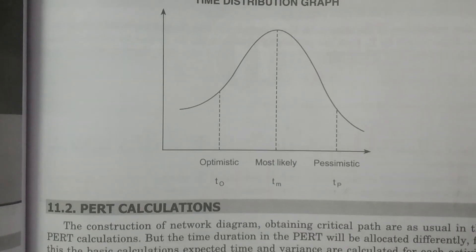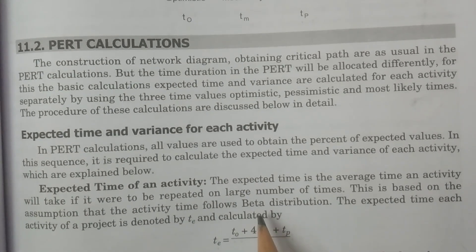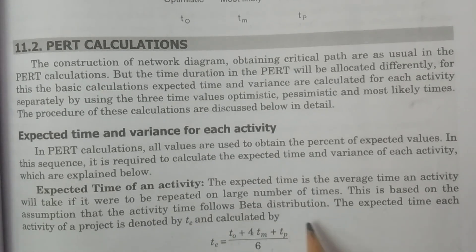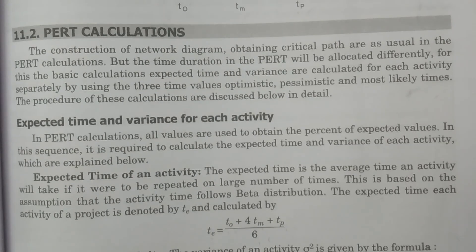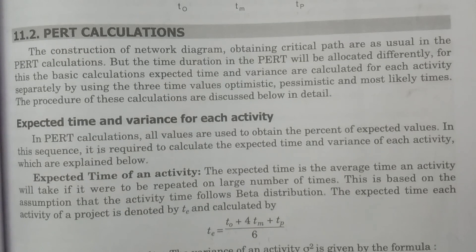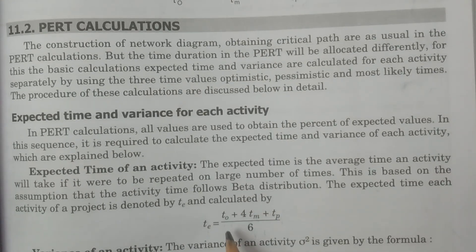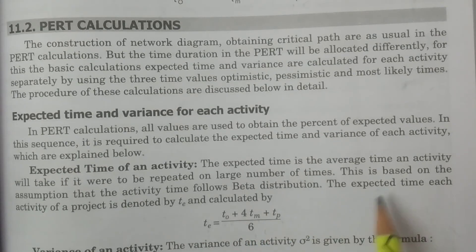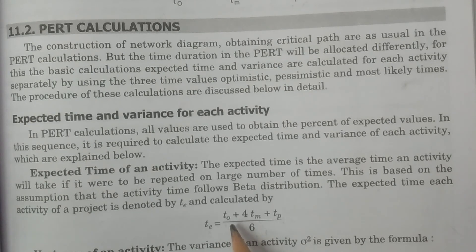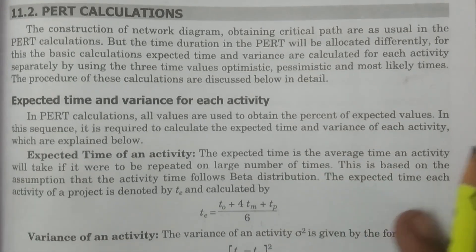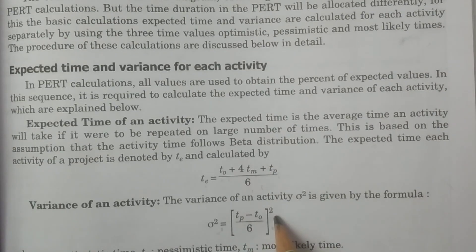Now, the calculations of PERT are straightforward. The activity time follows the beta distribution. Using the three time periods T-naught, Tm, and Tp with the beta distribution, the expected time of each activity is denoted by Te and calculated as: Te = (T-naught + 4Tm + Tp) / 6. The variance of an activity is calculated by the formula: σ² = ((Tp − T-naught) / 6)².